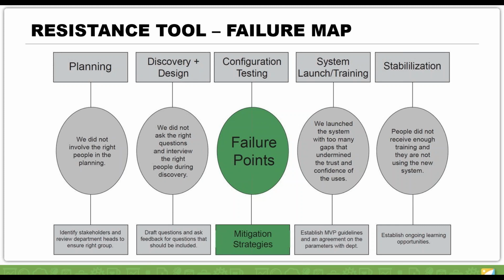What might happen? And then once you've got those listed out, you take a look at them and you cross out the ones that are out of your control. Because some of them we can't do anything about. So for instance, you can't do anything about the volunteer that might never sign up for an email address, right? They're just never going to have an email address. You can't control that. That is outside of the control, so we're not going to work on that. Once you've got those identified, you can work on your own or with your team to inform how you would mitigate what is going on, how you would address what comes up if it does come up.